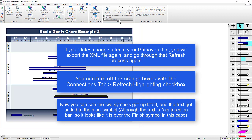If any of your dates change in the Primavera file, you will just need to re-export that XML, and then you can go through that refresh process again and get those new dates.